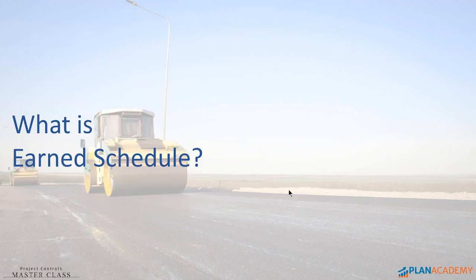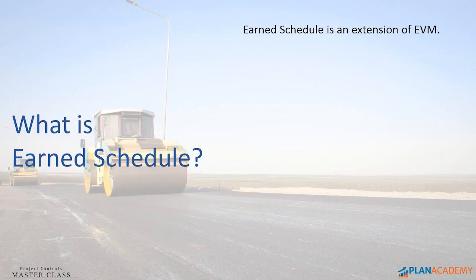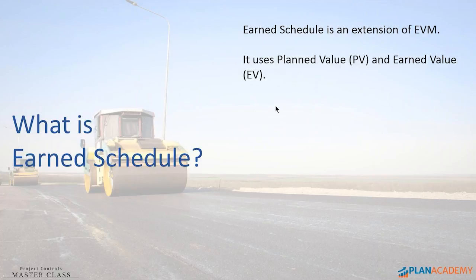Enter Earned Schedule. So what is Earned Schedule and what does it do for me? Earned Schedule is an extension of Earned Value Management. It uses many of the same things that we're used to seeing — it uses planned value and it uses earned value, and it uses those two in the calculations.